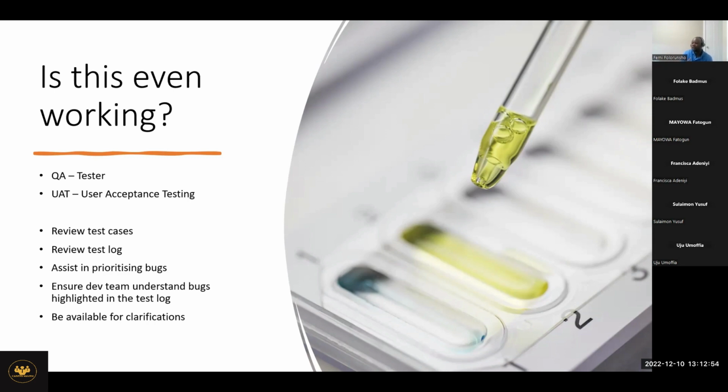So I asked the developer, if we want to do this, how long is it going to take? Give or take, a day to fix it. "Are you sure? All these 16, or 10, 11 items?" He said yes, they are pretty simple. They have templates you can just import, and they already have all the underlying parameters defining what goes into each field for emails, phone numbers, and so on. I said, okay, good. I reached out to the PM and asked, do we have 1 day of this developer for this purpose? He said, sure, because we're almost done with the project and we have almost another 6 weeks for launch and post go-live activities. So in terms of timeline, we were good to go. The developer committed to these things and fixed it.